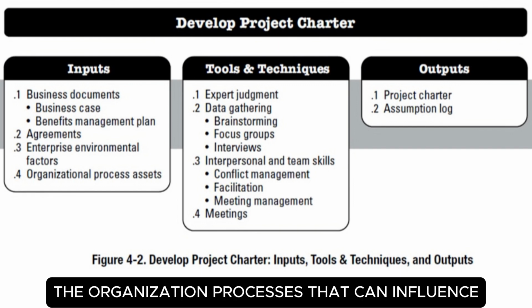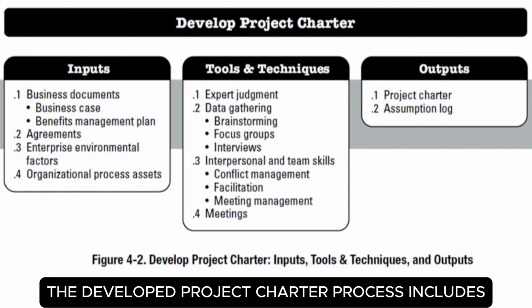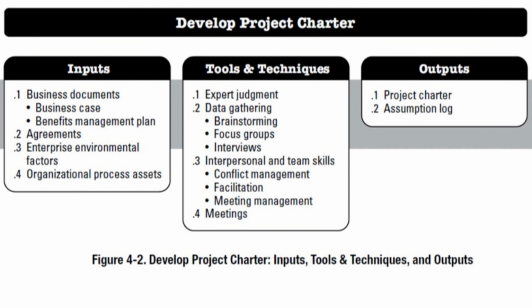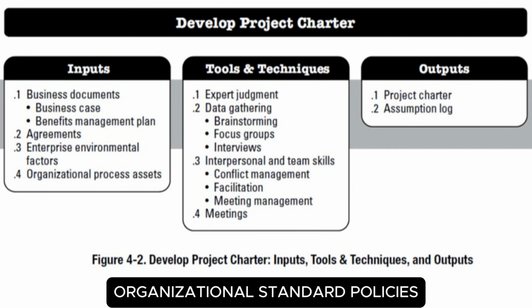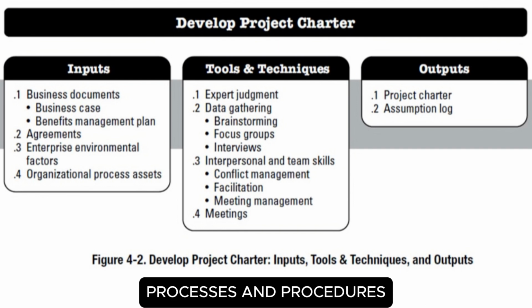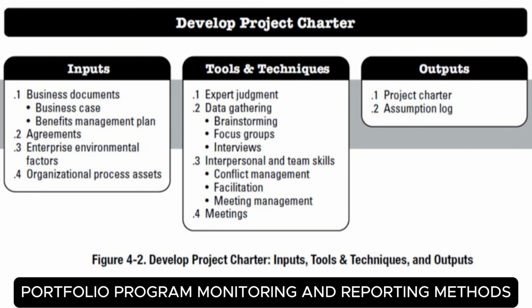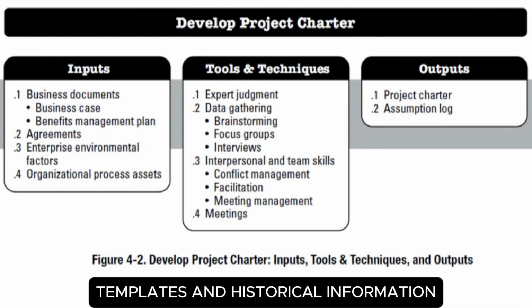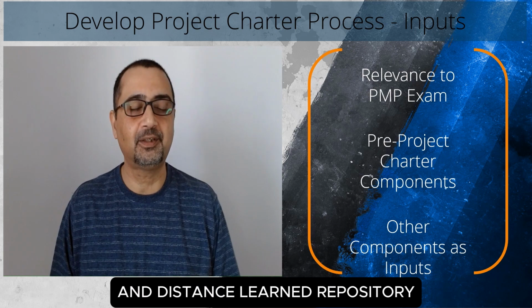Organizational process assets. The organizational process assets that can influence the develop project charter process include organizational standard policies, processes and procedures, portfolio, program, and project monitoring and reporting methods, templates, and historical information and lessons learned repository.